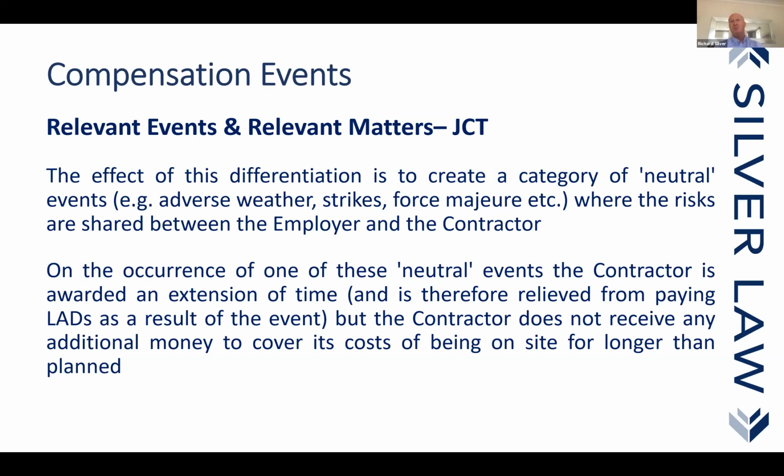So the fact again that the works were, let's give you again my refurbishment works, and let's say this time that the situation is that we have two critical paths, the external works, which is critical, and the internal works, which is not. And there's loads of additional works in the variations, other matters internally. The fact he's awarded me an extension of time for exceptionally adverse weather conditions does not mean I can't recover prolongation costs associated with the internal works, because but for the internal works, all these resources would not have been on site. So, mindful of that. Do be aware, relevant events and extension of time will be support of entitlement to loss and expense, but does not mean you're not entitled to recover it where it's a neutral event.